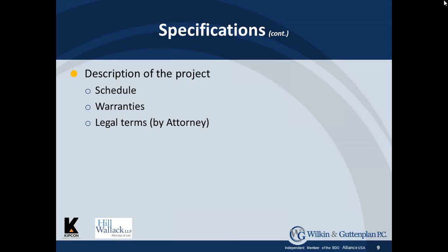Warranties on the work that's being done, as well as the legal terms, which Ronald will talk about in a few minutes. But I just want to mention that the warranties are very, very important. When you're talking about a roofing job, sometimes the warranties are more important than the roofing itself, because the warranty will tell you who's going to fix what if it leaks. When you're dealing with roofing especially, it's very important to understand what the warranty is, how long it's for, and what it covers. And that's a key part to the specifications as well as the contract.